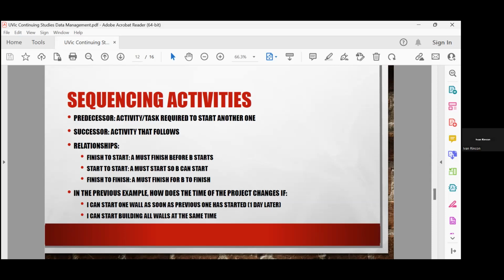Well, I have been in projects. I remember one that I did once starting my career here in Canada, in which we did what we call an ETL, which is extract the data to start the analysis of the data. The ETL took us 5 months. Extracting the data from that huge database took us 5 months. Could I have planned for having the ETL done in 1 day and then start doing the rest of the work? Of course, I would have been able to plan that.